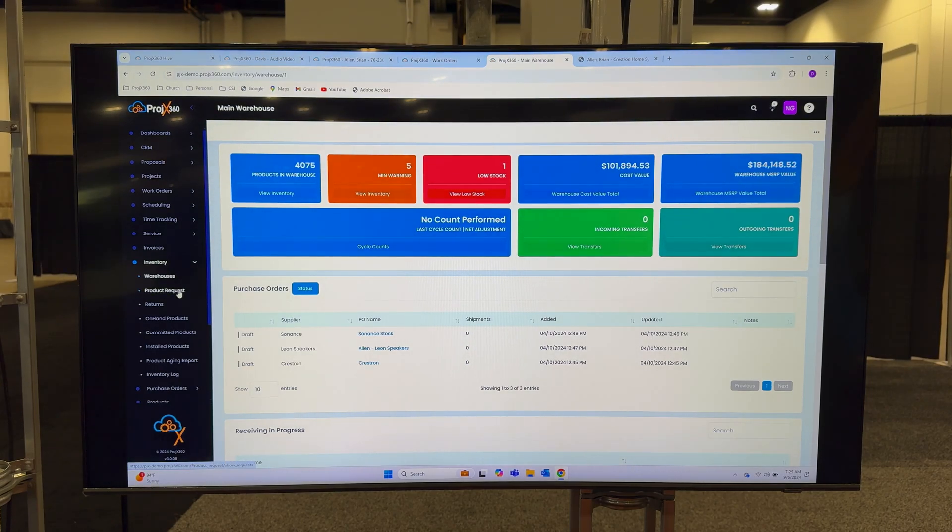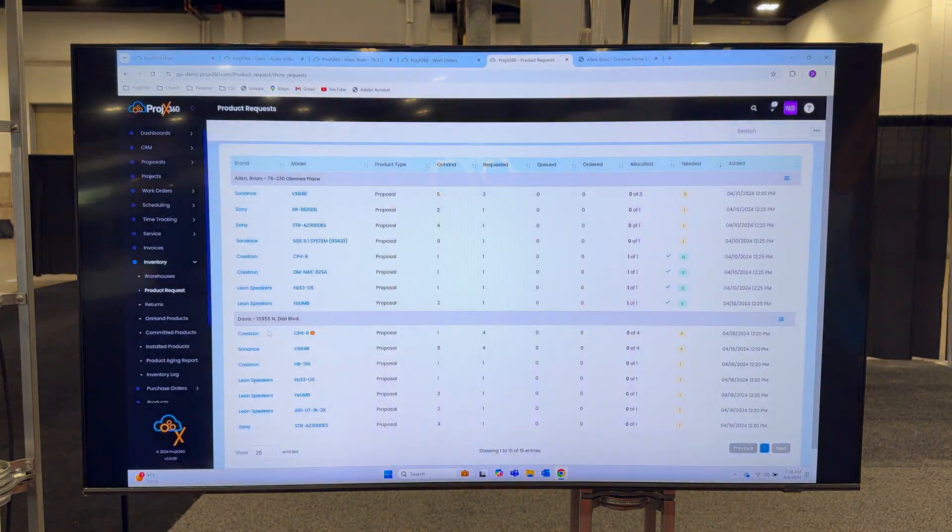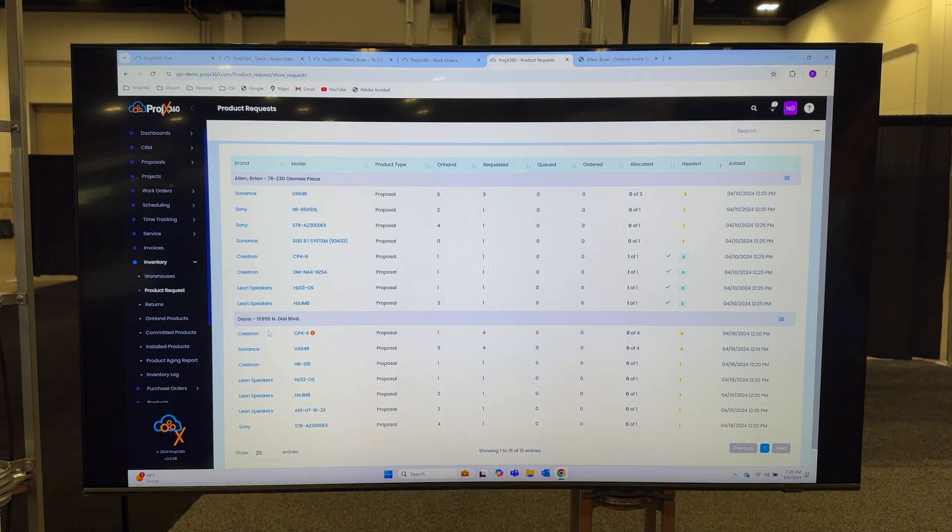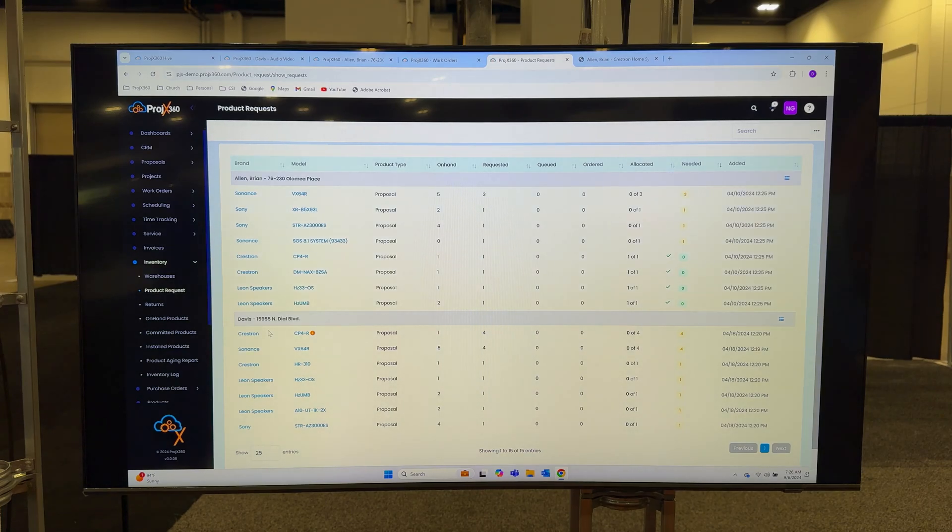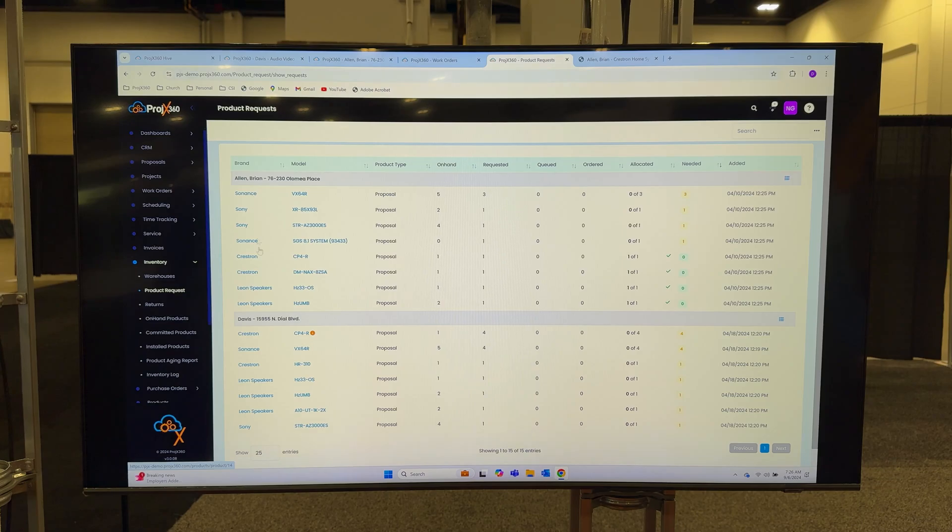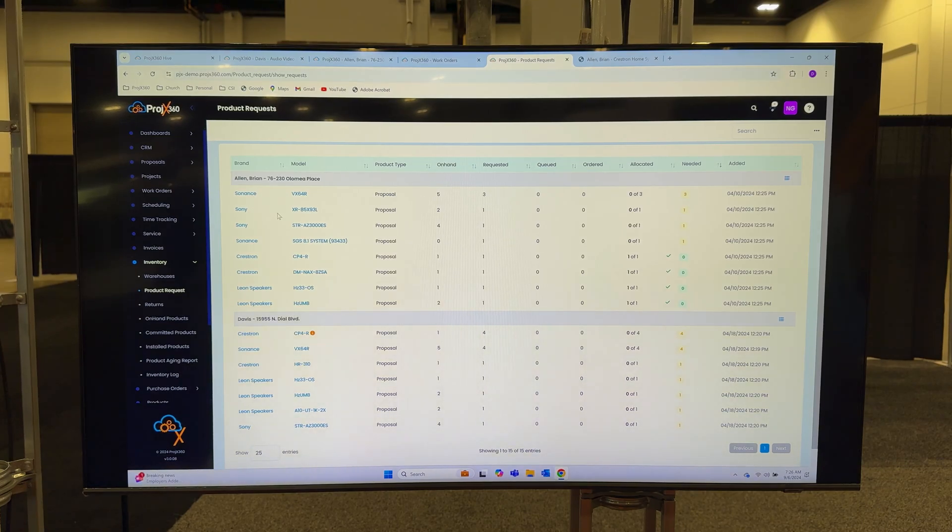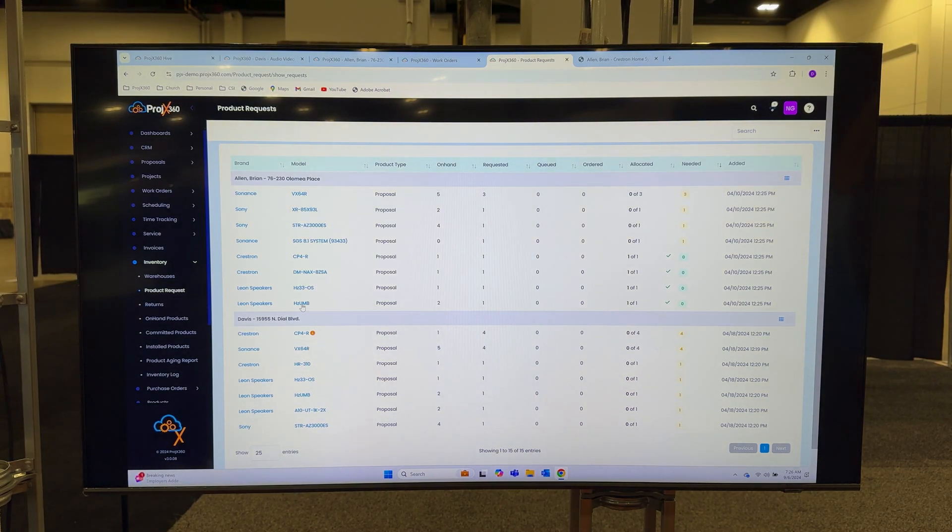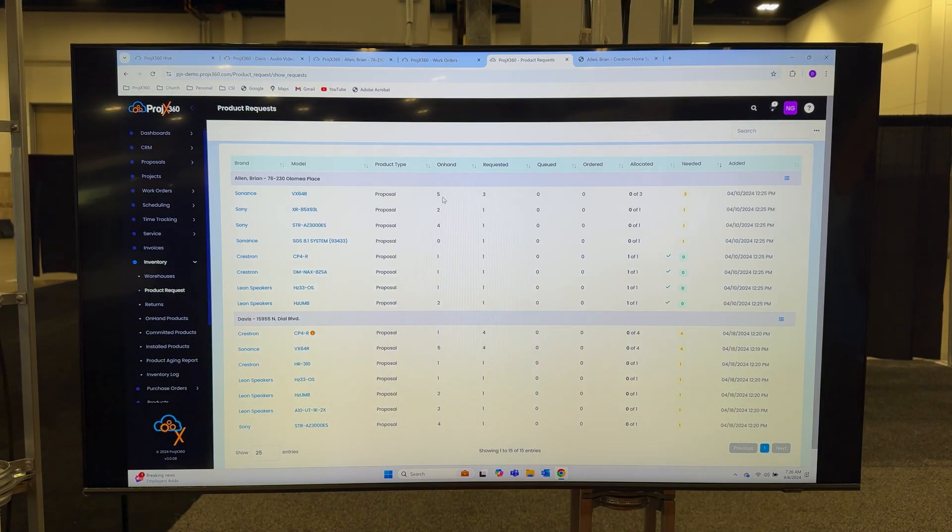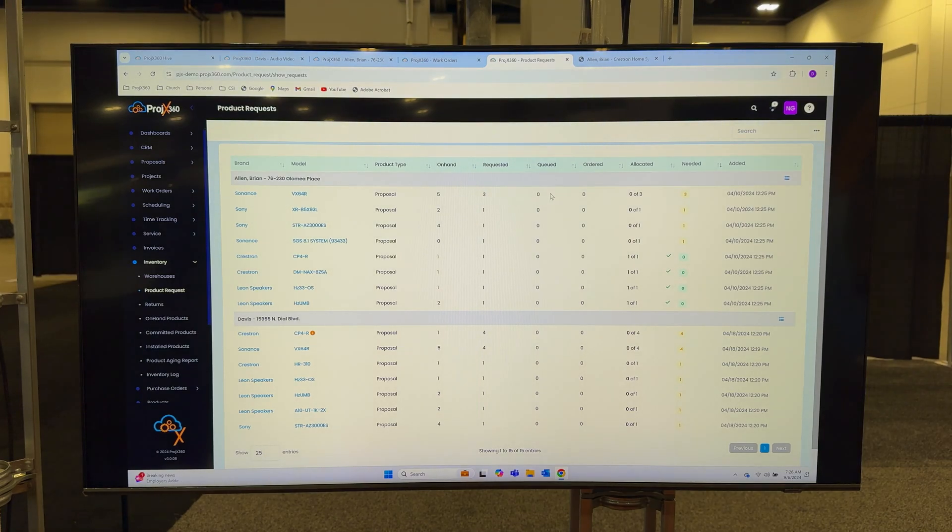What we have is project managers can request product as the projects are moving along that needs to be ordered or allocated right from the proposal, and it comes over here to what we call our product request page for your purchasing and inventory department. It sorts everything by project and it tells them what was requested, if any of that product they have on hand, how many were requested, if it's been sent to the PO queue to get ordered yet, if it has been ordered yet, and then if it's been allocated.